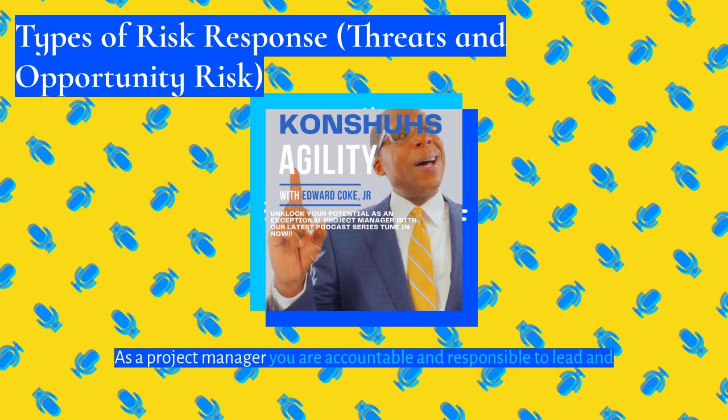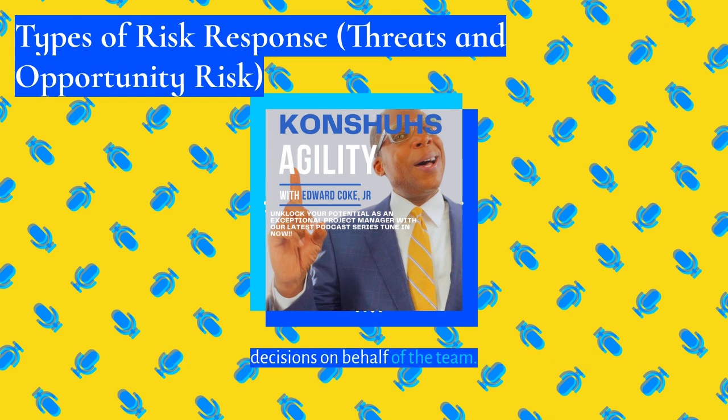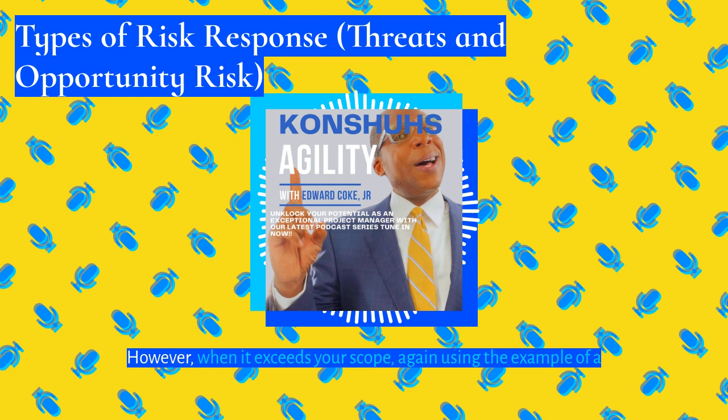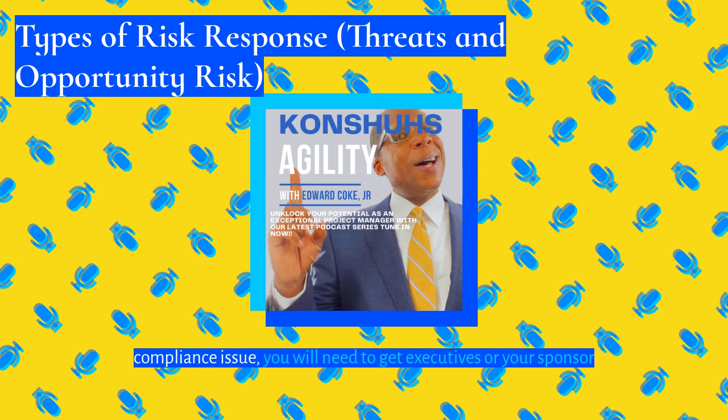As a project manager, you are accountable and responsible to lead and help the team make decisions, or you make decisions on behalf of the team. However, when it exceeds your scope, again, using the example of a compliance issue, you will need to get executives or your project sponsor involved to address that. So again, provide comprehensive documentation on potential impacts and propose responses.